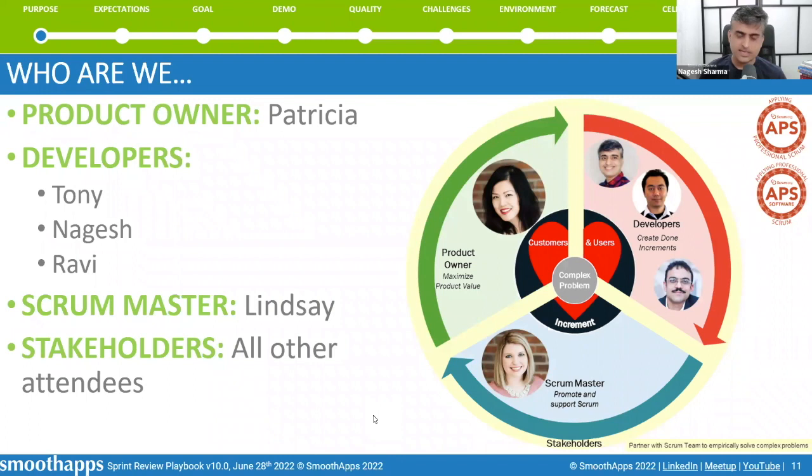Absolutely, Ravi. One of the things which has been very helpful for me in effective sprint review facilitations is setting the expectations with the stakeholders in advance. To give an example, what I have found very helpful is the product owner already setting expectations with the different kinds of stakeholder personas. Imagine you have a compliance manager or a legal person representing the legal department in the sprint review. Specifically, what kind of feedback is expected? What kind of product backlog items are we having conformance? Do we have any non-conformity? Similarly, you may have somebody representing product marketing. What is exactly expected of them? Perhaps something like, are we aligned to our branding guide? How about our outbound messaging? In that way, it is very helpful because, as Ravi said, we all have our role to play during sprint review. Thank you, Nagesh.